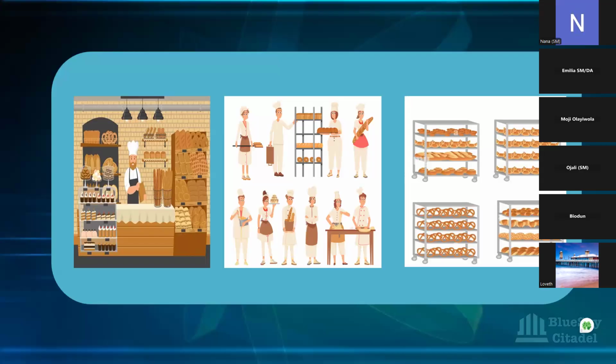If he doesn't want to get a temporary staff, maybe because he feels it would affect the quality of his product, and there's no way he can push the other 8 staff to do more, one of the things he can do is prepare his end users, the customers, the client, to say that on these 2 days you will be getting less because of this. So that helps him because that capacity planning had happened.